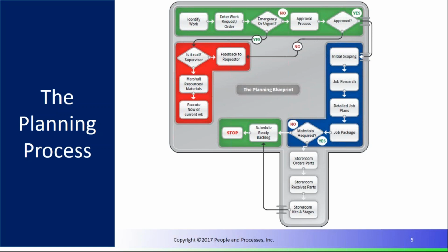For example, I might find that the planner can spend all day looking for a particular part, can spend tons of time trying to get a quote on a particular part. And then it goes over to the buyer, maybe in the stockroom, and that individual says, I've got these handshake agreements with this group over here. I'm going to get a price from them, and they end up getting the item from that individual, and yet the planner spent all this time doing it. So it's a perfect example of how we really need to be clear with regard to the roles and responsibilities, and establishing the business processes up front helps us establish that.